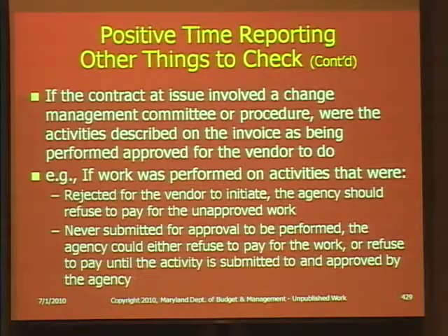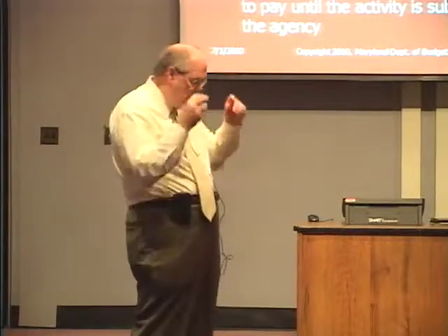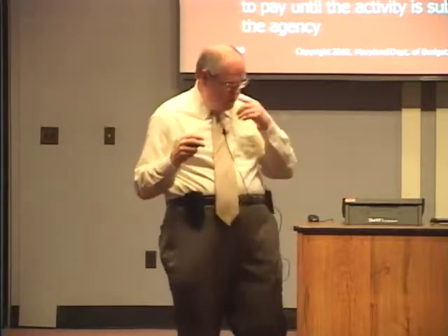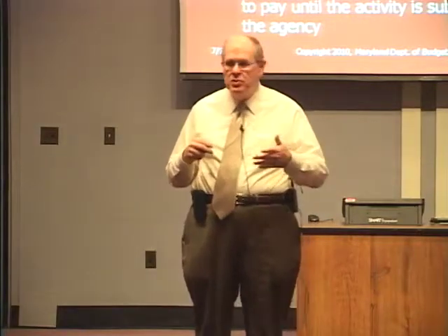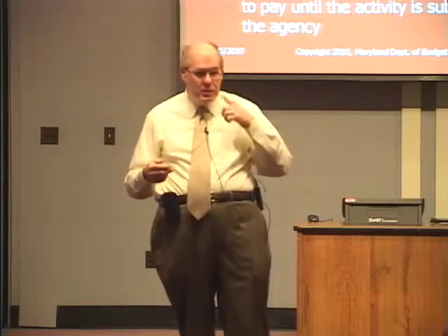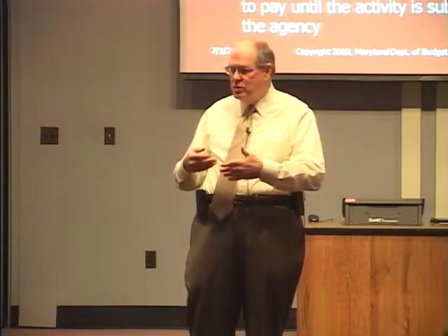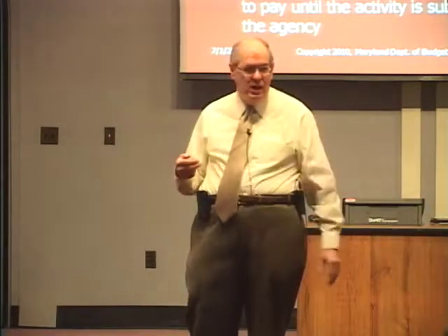If the contract at issue involves a change management committee, so this is another way of looking at what kind of approvals might the contractor have to do before they can submit a bill for something. Change management, we've talked about the activity where it's not known absolutely in advance what the contractor has to do. It has to kind of be fleshed out as they go along, and there's supposed to be a procedure for approval of what the contractor is going to do each time as a next step.